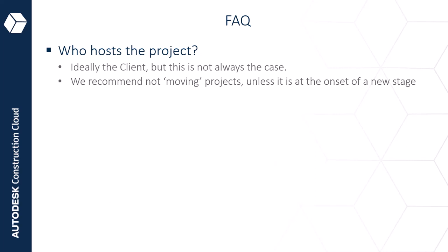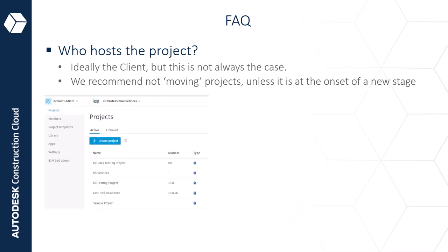But one thing to consider is that we do not recommend moving projects from one account or from one hub to the next unless it's at the onset of a new stage. So if a consultant hosted the project during the design stage and perhaps only in construction, the developer or the client said, hey, I want to get on board, then move it as it moves over to construction. But ideally, it's not the best idea to be moving project information around or to have multiple projects. So the client hosts the project, but you also have your own project, because that goes against the idea of a single source of truth.